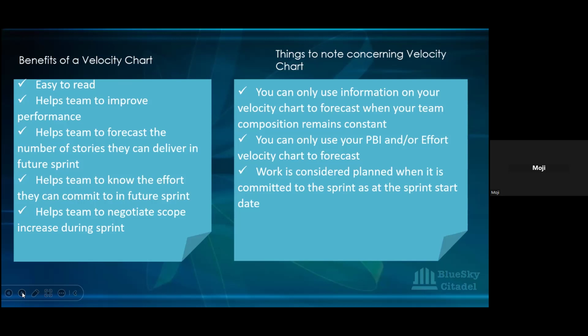So the product owner comes during the sprint. We already have the 50 that our chart is telling us we can do. And the product owner comes and says, oh, you people need to add this also. The stakeholder wants this done. And let's assume that requirement has 13 story points. Now, you know that if you add that to your 50, it's going to be 63. And you know we have full capacity. Normally, our average velocity should be 50. It shouldn't be more than 50. But now the PO is coming with a 13.